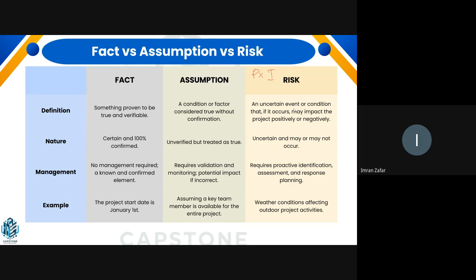But this is a very logical kind of question: maybe we are not going to get the budget or the resource when we need it, although we had the assumption. So what do we need to do if something has not happened as we assumed? First we need to assess the impact, how, since the assumption has gone invalid, it is going to impact our scope, our schedule, and our overall delivery. And then we need to obviously react to it.